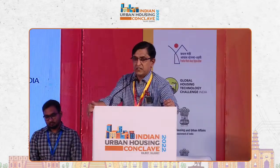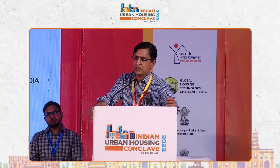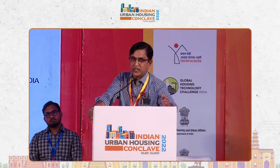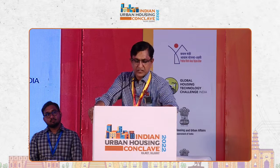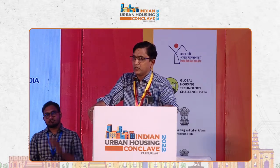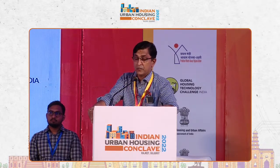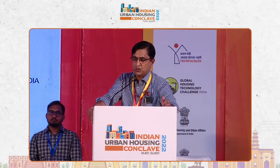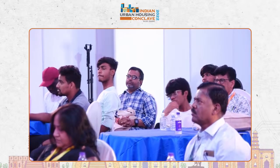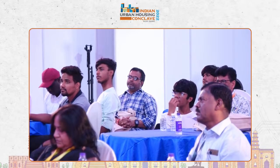Because as Sir mentioned, CPWD is often taken as a base document, CPWD publications, our daily schedule of rates, our analysis of rates. So we have to take care that we allow them after certain checks. Having said so, I would like to mention that very recently we have introduced, rather made almost mandatory, for all our major tenders to be called in EPC, engineering procurement contracts as they call it, mode with technology neutral orientation.